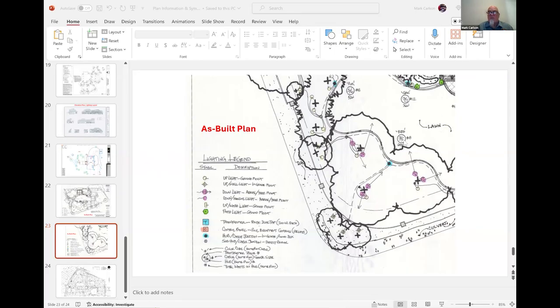Don't put this kind of information on at the front end, like I mentioned, the conceptual end. Do it only at the as-built stage. So then that way you have record documents for yourself. You can give a copy to your installer if they don't have the information, and you can also give one to the homeowner if they desire it. Most of them can't even read this anyways, but it's just good information to have.